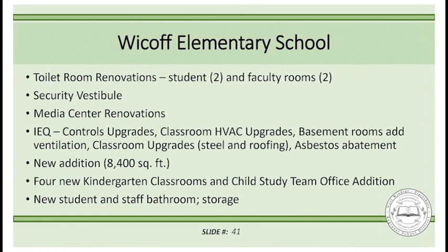And I'm going to say the word asbestos, because when you have old buildings, it's not illegal or unhealthy to have asbestos. But when work is done to facilities that had the original asbestos tiles and stuff like that, you have to do a very specific asbestos abatement plan in order to protect that the fibers and whatnot don't get into the air system. So things get taped off and the facility has to be shut down and specific cleaning protocols have to happen. And there is an asbestos management plan that every building is required to have by code. So this is just sometimes a scary word, but I want to put it out there that this is to be expected in buildings, especially older buildings, as you go through renovations. So you have to build in the money because the remediation process takes some time and it's costly.